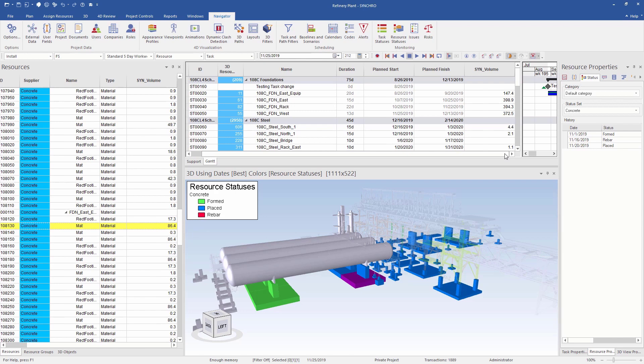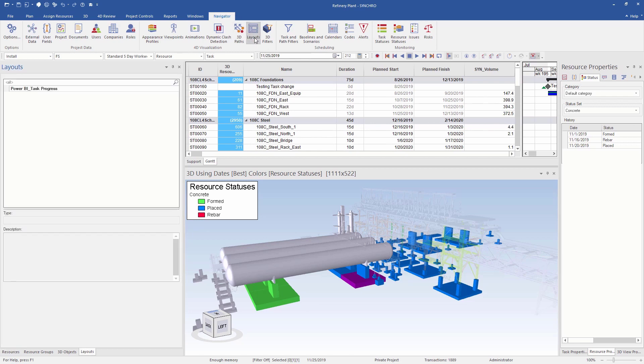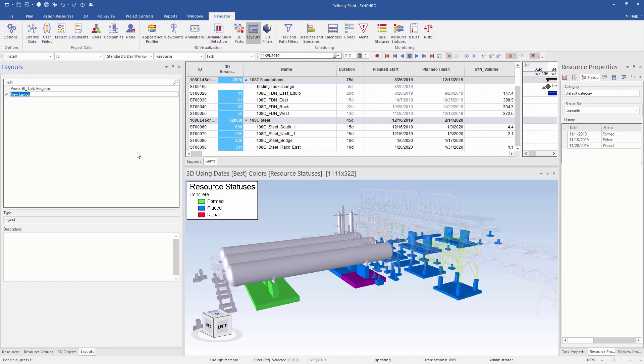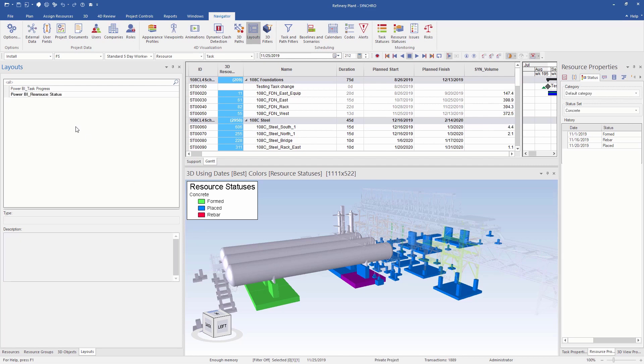To streamline the process, we can use the layout functionality, which can be found under Navigator ribbon. A layout saves the current state of your tables for all the entities, including tasks and resources. It includes the column visibility, filters, conditional formatting, etc. So every time before exporting the Excel spreadsheet, you can open one of these layouts and simply export.